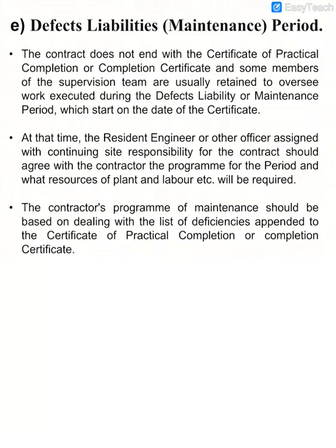Alright, now we move to defect liability maintenance period. The contract does not end with the certificate of practical completion. Some members of the supervision team are usually retained to oversee work executed during the defect liability or maintenance period, which starts on the date of the certificate.